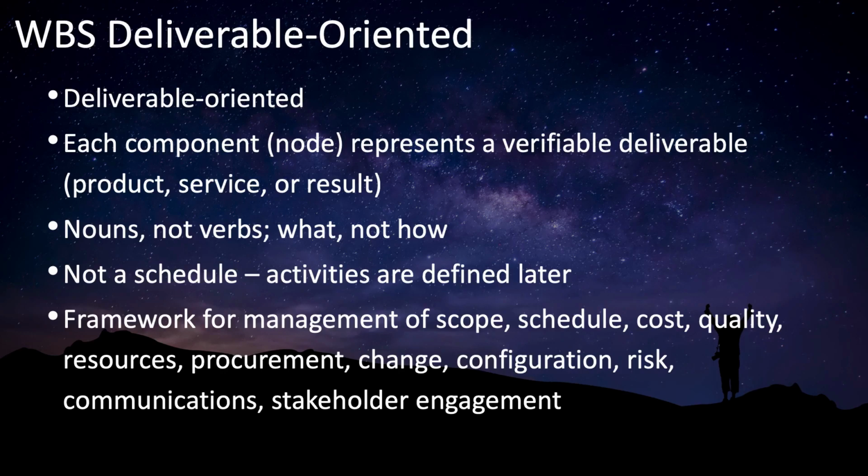In particular, the work breakdown structure is not a schedule. It shouldn't include the activities needed to complete the work. The activities will come later. There are separate processes and separate project management deliverables for putting together the list of activities and the project schedule.